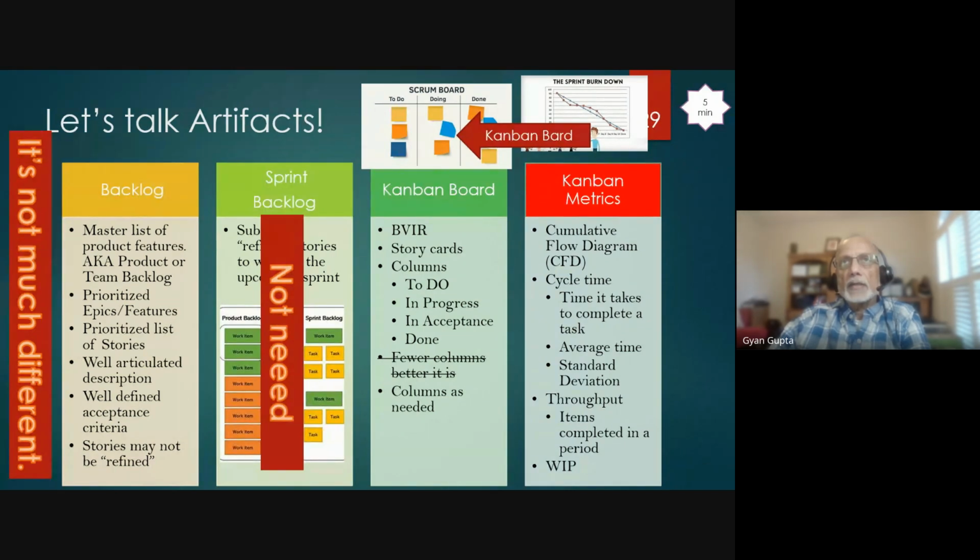That's the WIP. Anything else? I'm losing my thought right now. Okay, it'll come back to me. So that's the WIP limit for each column, to avoid congestion, avoid bottleneck, right? And remember we talked about earlier, if the testing is the bottleneck, then the developer can jump in to help with the testing. That's the advantage of that. So that's the artifacts we have for Kanban.